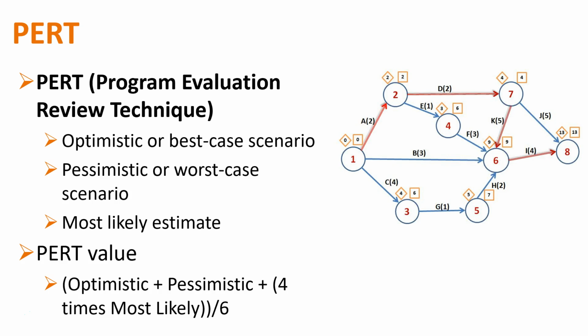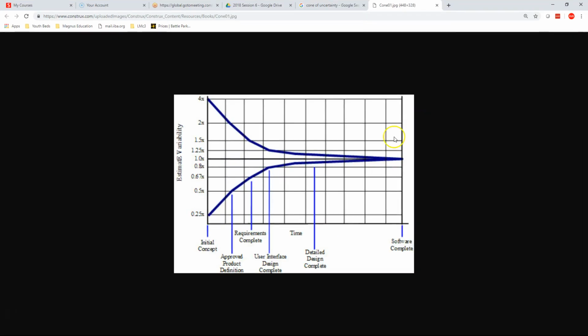When you communicate, you still use the range from this. You still say 6 months to 8 years. Wow, that's like a big range. Why? Well, we haven't even begun understanding which ERP we're going to use. We haven't really begun understanding our processes from the perspective of an ERP conversion. Once we actually start digging into a little bit of that and we understand our current state, this is strategy analysis, this is requirements analysis and design, this is solution design.